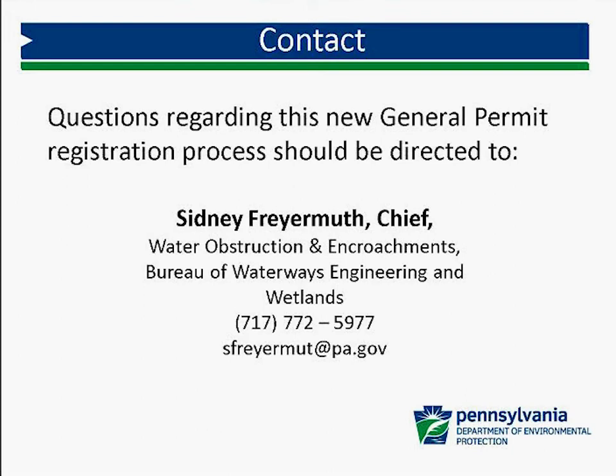Will GP1 still require PA Fish and Boat authorizations? The answer is yes. On the previous GP registration form, there was a place for PA Fish and Boat to approve the structure. That has been misinterpreted, where people felt that they got Fish and Boat Commission authorization.